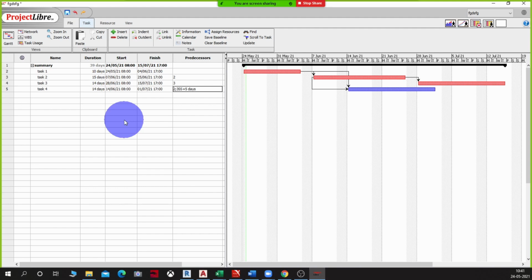Okay, but even then, it should be only an increase of 1 or 2 days, right? No, no. As in the weekends. 10 plus 15, 25 days. This will be spread over each of the weeks, over 3 weeks, right? So that means it'll add 2 plus 2 plus 2. Right, so that would be the error that you will see. For that reason only we had done that exercise.